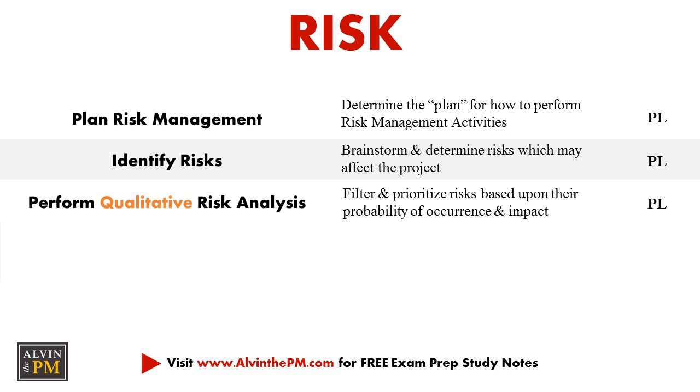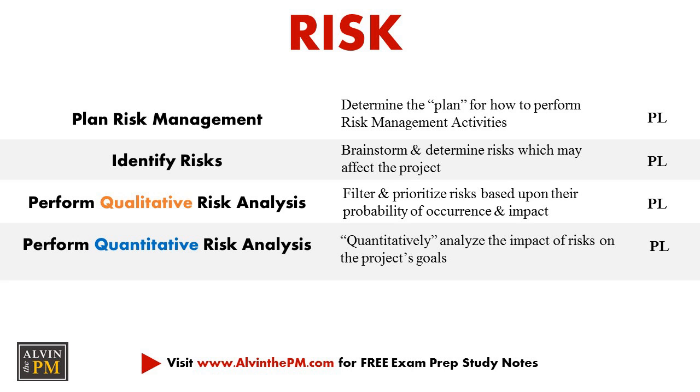Now, after performing qualitative analysis, we'll perform quantitative risk analysis to numerically analyze the effects of the top risks on the project. Due to limited resources and budget available, quantitative risk analysis should be performed on only the top risks. So only do this on the risks which have the highest severity and impact.